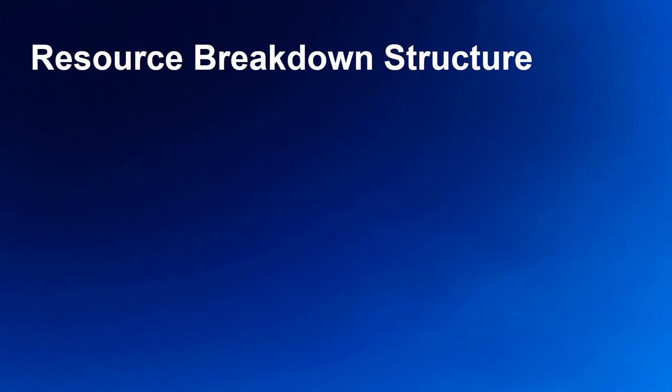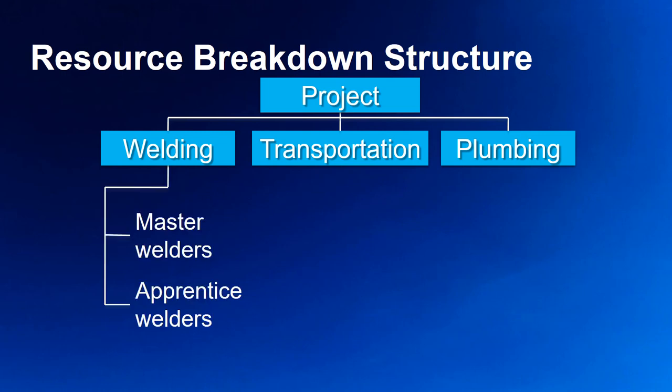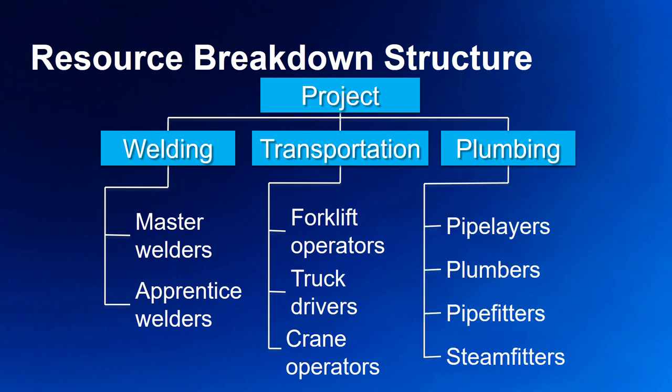The resource breakdown structure is our third output — a great way of showing required resources in a graphical format. An example would include human resources needed across categories such as welding (with a master welder and an apprentice welder), transportation, and plumbing. Note that we're only talking about categories here — we haven't yet assigned individuals. We would need to consider the different roles and types of resources required, which may include required licenses and certifications, skill or grade levels, and knowledge and experience.